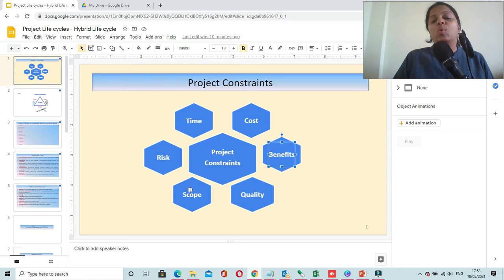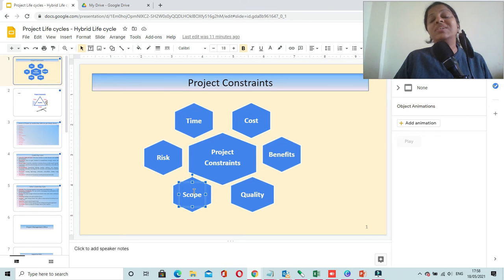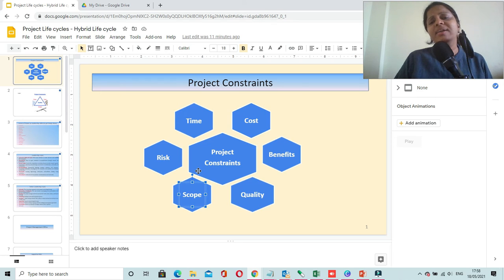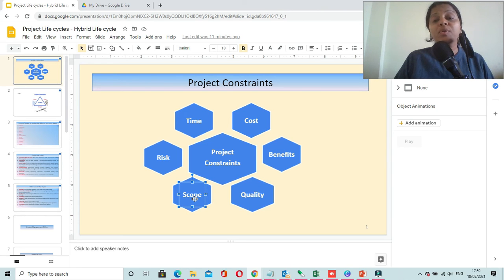Then we have scope. You have to manage scope throughout your project life cycle. If your customer is coming to you with changes or more requirements, you have to follow the change control procedure and evaluate all those changes with respect to the other constraints of your project. The change control board conducts these evaluations. If you fail to manage this constraint, your project might fail.